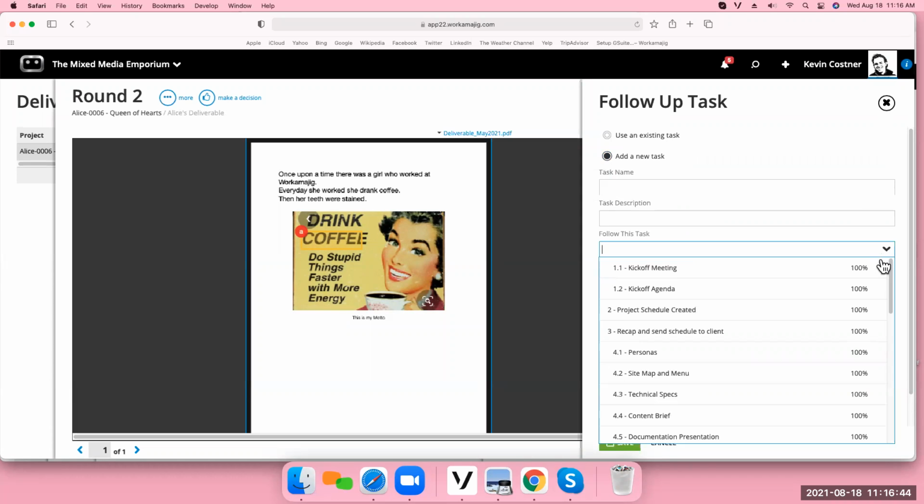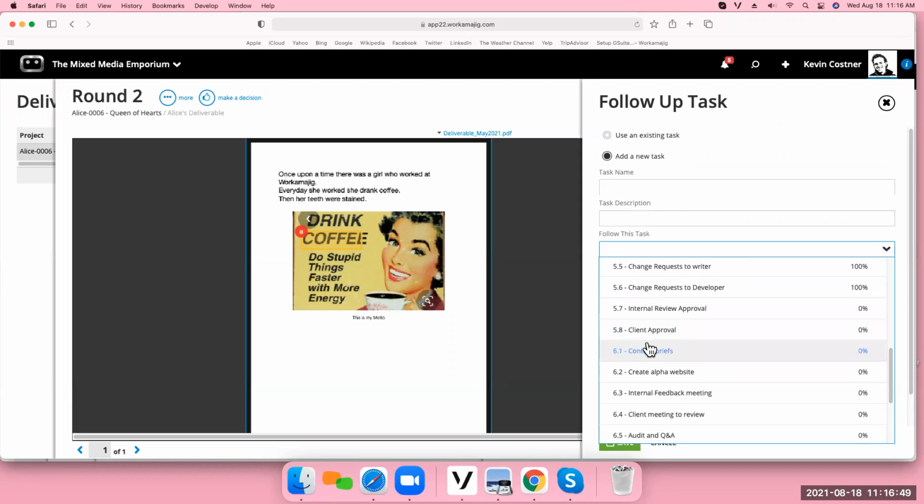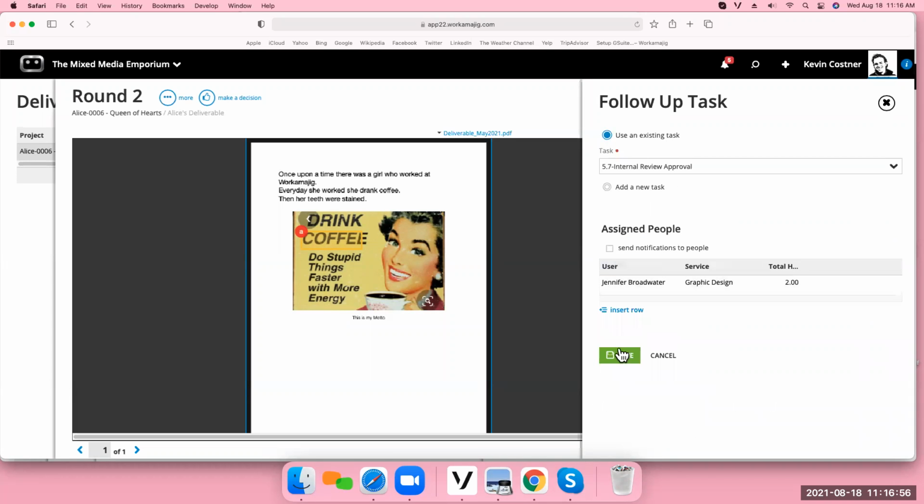We give you so many options you can do. I can come down here and say, oh no, I want to shove it in after this one, which I'm not going to do. I'm just going to leave it as that and use the existing task. But I could create a whole new task right from here. This is also going to tell me on that task that I was assigned, I had 2 hours total. I don't like the way that cuts off. Total hours is 2. At this point, I'm saying, hey, it's going to take you another hour to fix this one little thing on here. So I'm going to change and give you 3 hours now.